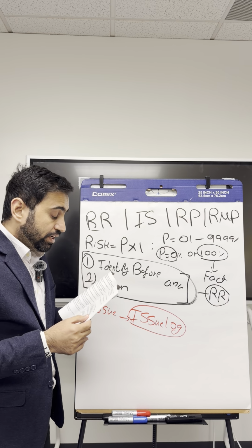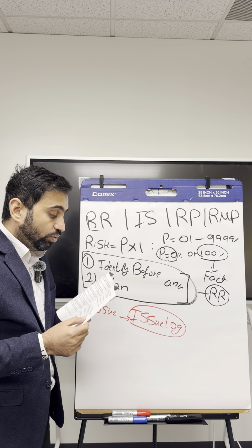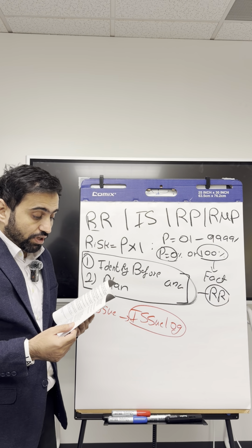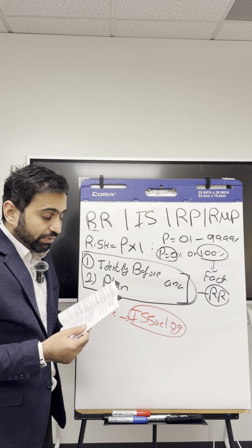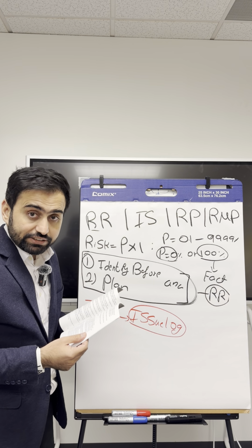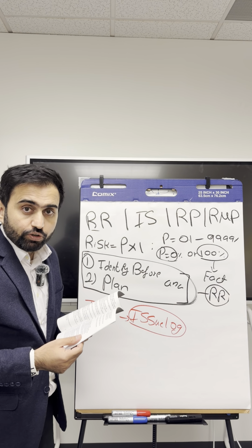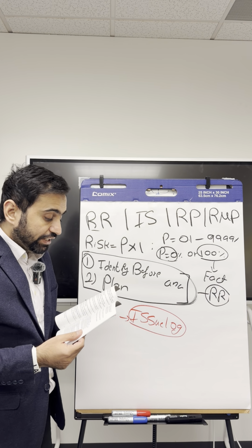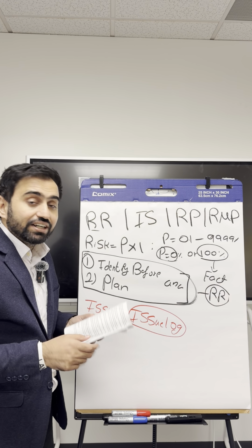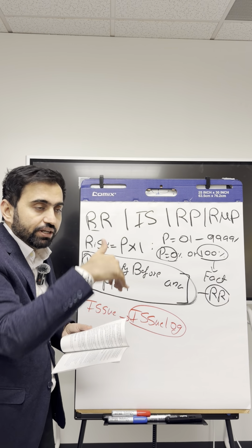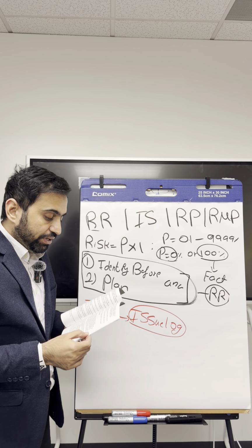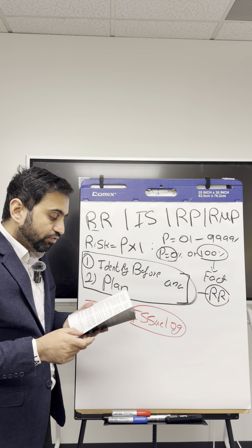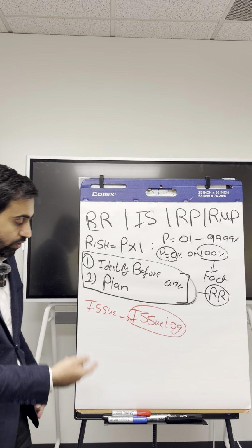Now that's step number 1. Conduct a root cause analysis to understand why the issue was not identified and planned beforehand. Determine if a change request is necessary to address the issue, and if so, submit a change request accordingly. If the change is approved, implement the response and update the issue log. The issue can reoccur in the same project, like something can happen again in the same project you are working on, so update the risk register. And of course, at the end update the lessons learned register for future projects. Okay, that's how you enter the issue log.